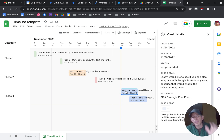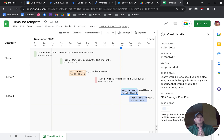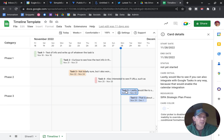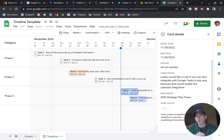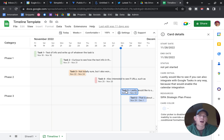It's a pretty nifty first step towards fuller project management directly within Google Sheets. Playing around with it, there are a couple of elements needed to make it work: you need start date, end date, title, and details — the rest you can assign. When you click Timeline it walks you through a wizard where you pick what the title is, where the date should be assigned from, and if you have color codes assigned, you can pick the column for that.